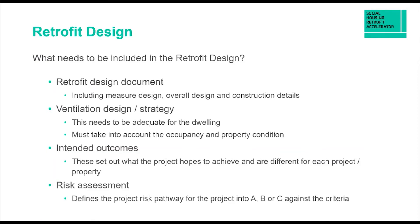Within the retrofit design there are several key elements. The first is the retrofit design document itself, including the measure design, overall design, and relevant construction details. You need to produce a ventilation design or ventilation strategy that is adequate for the dwelling and takes into account occupancy and property condition, because the number of occupants has a distinct impact on ventilation requirements due to moisture produced during daily activity. You also set your intended outcomes — important for the monitoring process — which are different for each property, and you finalise your risk assessment, defining the risk pathway as A, B, or C against the PAS2035 criteria.